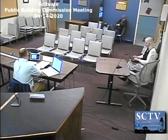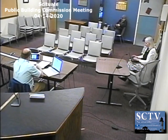Okay, thank you, Steve. Currently, the senior center building foundation is approximately 80% complete. They started the last 20% today, which is inclusive of the elevator pit walls. They have started backfilling on the interior of the foundation walls. Damp proofing of the exterior of the foundation walls started today. The elevator piston and casing was drilled and installed yesterday morning before the weather got too bad.